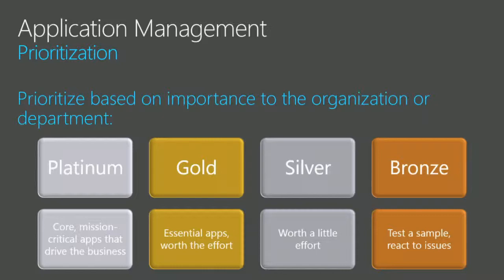Platinum applications, the most important ones that are critical to the organization, that drive the business, that can never fail. Test them extensively. We can tell you that they work. You won't believe us. You'll have to find that out for yourself because you're not willing to take that risk.